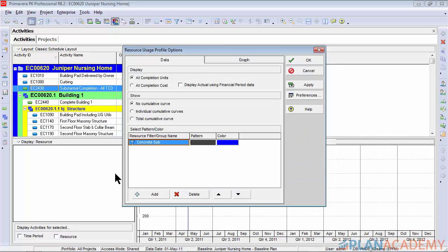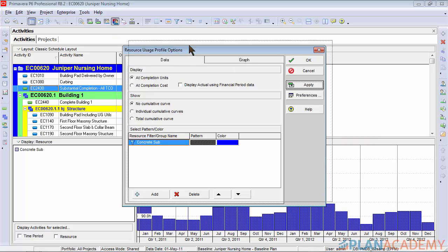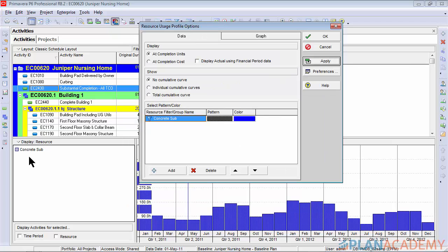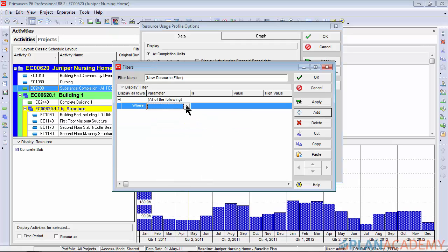Go ahead and click OK, and just so you can see how things are progressing, we'll click apply. Concrete sub shows up and here's the histogram for the concrete sub. Now let's start stacking different resources on there.